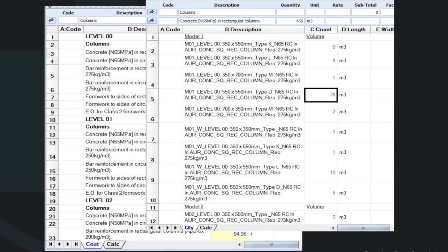Mapping is basically really complicated formulas, and we've now got formula geeks in our office. We sit around, we don't measure stuff, we're working out different formulas of calculating these crazy things, how we can filter information in different ways, what filters we need to put in place to be able to make that work. And basically, we measure elementally, we don't measure by trades. This is something we learnt a long time ago, and it's more effective for us to do it that way.